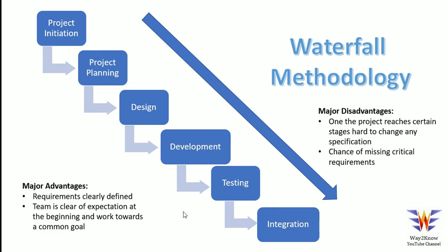Now, one of the major disadvantages is that, let us assume we are at some development or testing phase, and then we realize that a major change is required from the system perspective, and requirements have changed. And by that time, we already would have proceeded 1 to 2 months of activity in the design, and now everything needs to be approached again. While this is the major disadvantage of the waterfall, there are several methodologies like agile which eliminate this.